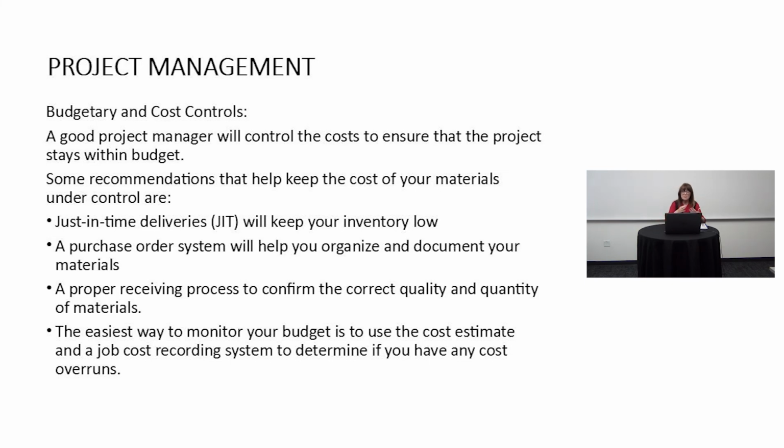The project manager and the supervisor and the foreman at the end of every day are checking to see how much product they used. They are recording everything that was done, and they are comparing it to their overall budget to see how much money they're spending as they move through time on the project. And this is how you make sure that you're not getting a cost overrun, which is the proper term for running over budget.